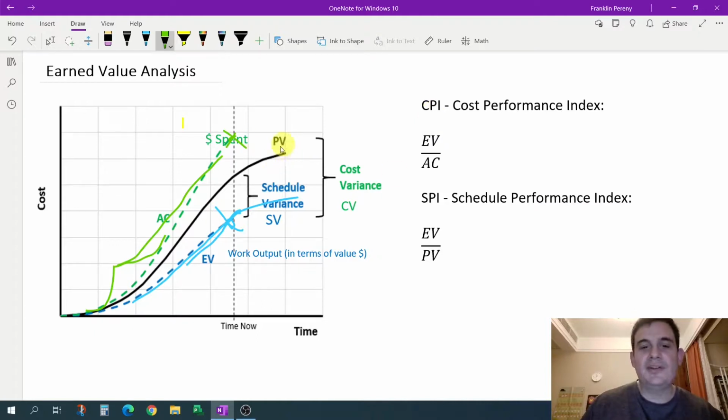You would take your original planned cost, which was, let's say, in our case, $10,000, and if your cost performance index is off, that $10,000 might now become $12,500, because you know you're off by a certain factor, a certain CPI number, and that probably translates to the whole project. If today you're off by 50%, one way to simplify it is to say all the tasks will be off by about 50%. So we think the estimate at completion is going to be off by 50%.